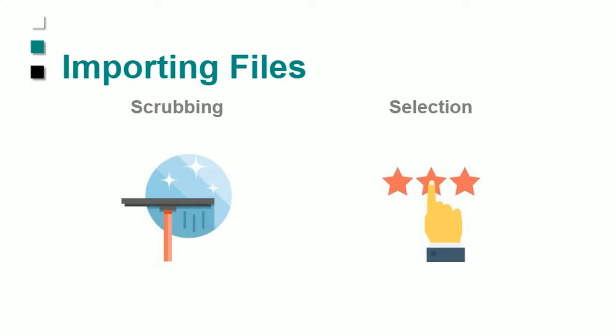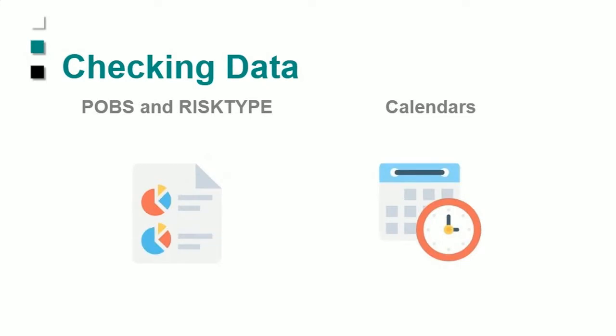Once you set that up, you don't want to have to do that every time you get a new file, because there should be a lot of overlap from one XER to the other from the same contractor in this example. So you get to set up what we call a scrubbing definition. Then, of course, you select the project or projects that you want to run this on. You can run it on one XER, one XML, one Microsoft Project, or you could do multiples as well.